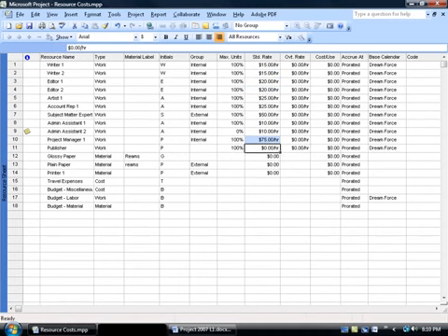Now keep in mind it doesn't have to be hourly. If you've got somebody that's going to be expensed weekly or monthly or yearly, just go ahead and type it in. So for example, if the project manager gets $5,000 a week, just type in 5,000, hit the / key, and then type in WK, hit enter, and there's your $5,000 a week. Now if it's monthly, think of it the same thing. Just type in 10,000 / MO for month and then hit enter.